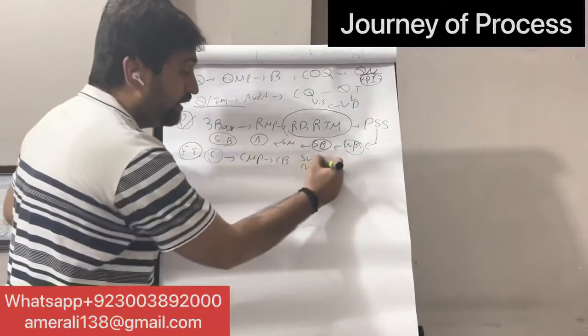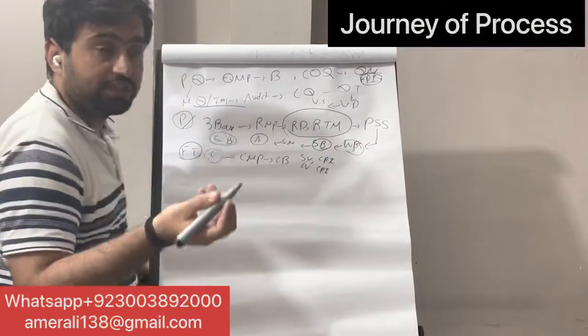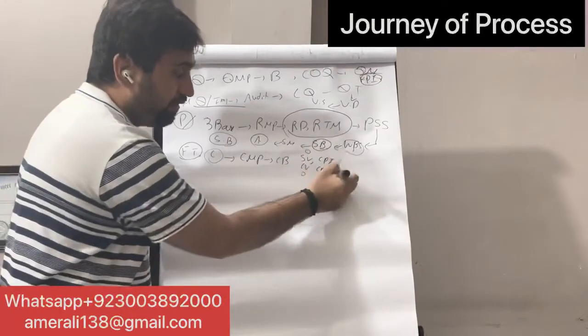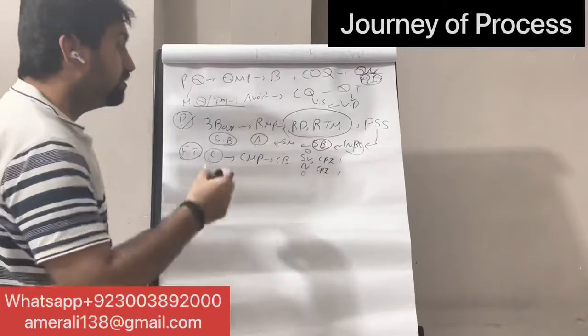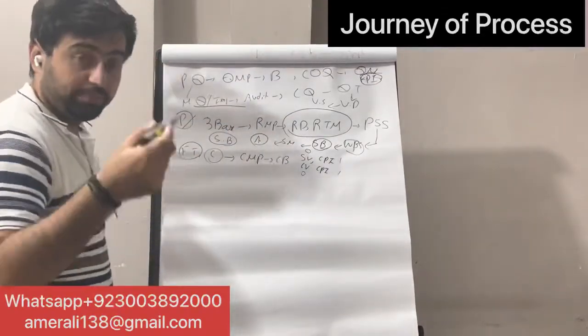Very important are CPI and SPI. If they are greater than 1, that's a good thing. If the variances are greater than 0, that's a good thing. If they are less than 1, it's a bad thing. On 0, it's an okay thing. So that's how the 3 baselines are done in a quick way. I hope that makes sense.